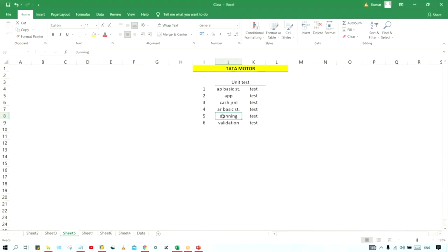So now what is happening? Half of the configurations are going to be done by you people, and half of the configurations fall under the other module, right? So let's suppose you have completed your half and the consultant has not completed his part, then what will happen, guys? Testing is not possible. So we have dependencies on those people. Until they complete their configurations, we cannot proceed further, right? So that is called dependency.